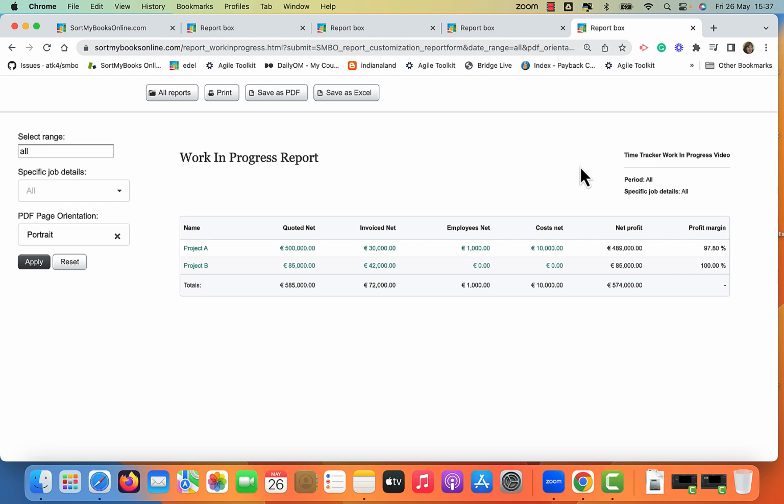The work in progress report has a lot more detail. You can see all your projects listed. If you put in a quote for the project, you can see what the entire project is worth. What have you quoted to the customer? What have you invoiced so far to that customer? How much is the labor on this project?